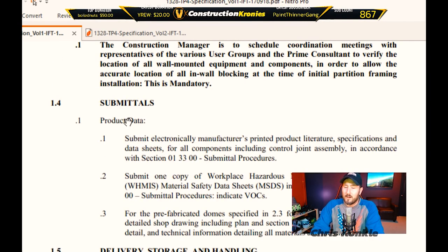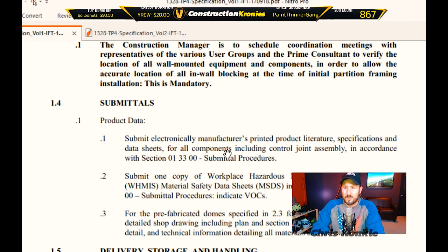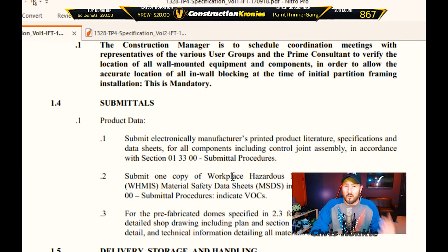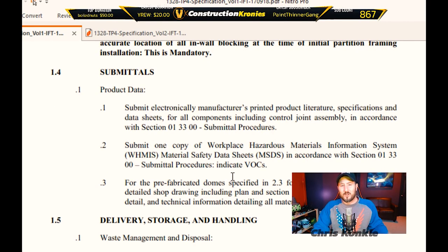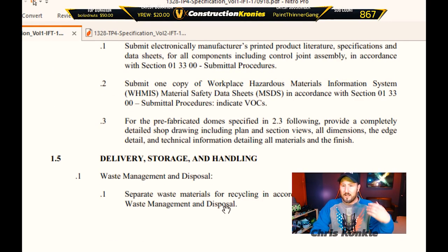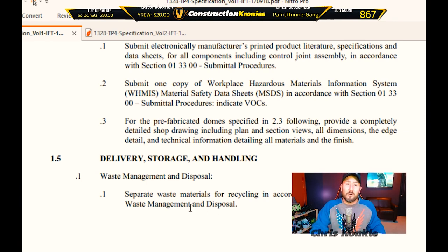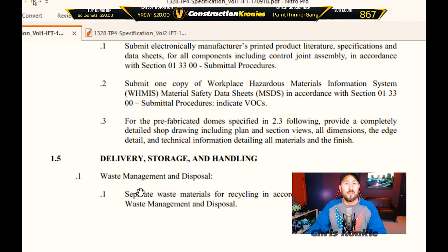The submittals are things you need to submit about the product — product data, submit electronically, manufacturer's printed product literature, specifications and data sheets. This is all the stuff you need to submit to the general contractor to go into the project manual, and it all takes time. Delivery, storage, handling, and waste management are important: separate waste materials for recycling in accordance with section 17419 waste management and disposal — that means it's probably going for LEED certification, so you need to put in the extra time to separate your materials like drywall and steel.